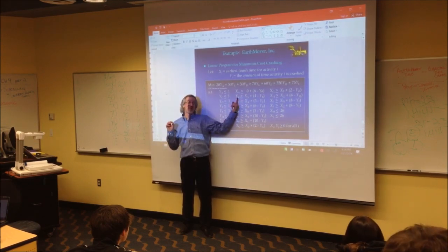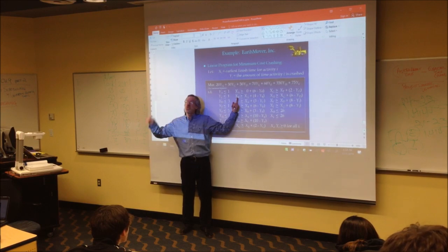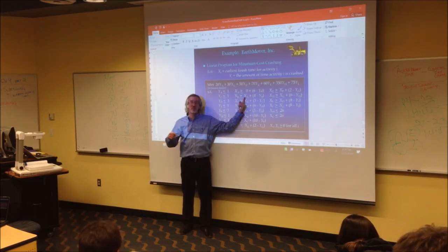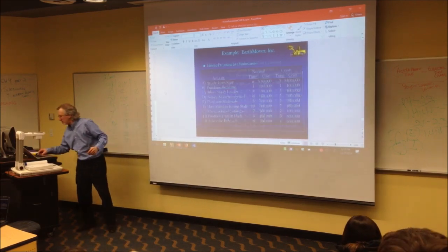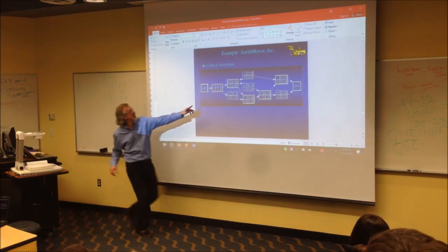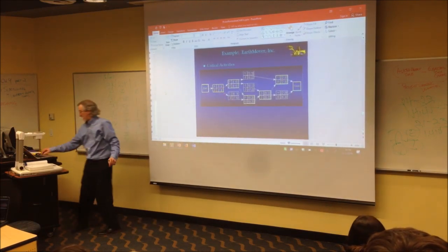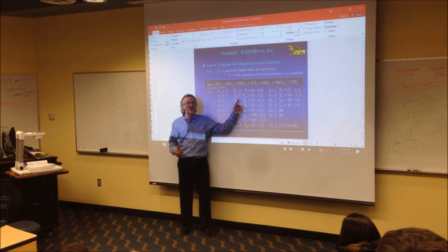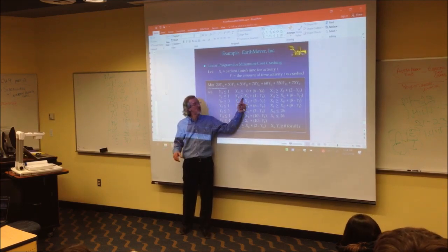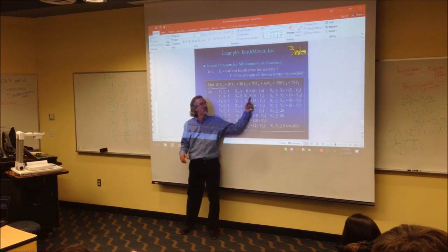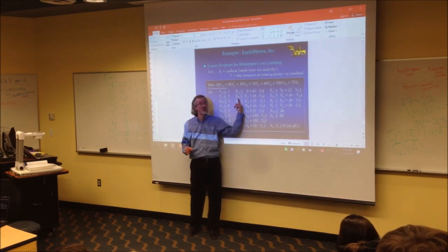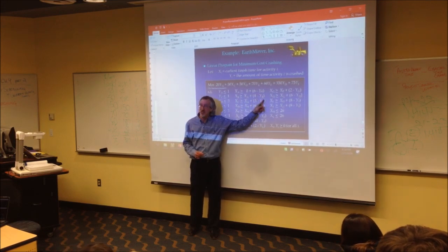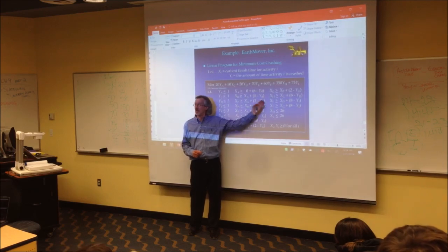So we're going to write an X constraint for activity B. The X variable for activity B, greater than or equal to the X variable for whatever activity precedes it. Well, we better go look at B. Sure enough, what precedes B? A. So we put X sub A there. Don't worry, this is going to get a little more difficult when we get to one that has more than one preceding. X sub B, we're writing this for B, is greater than or equal to the preceding activity's X variable, X sub A, plus, in parentheses, the normal time for the activity you're writing this for, which is 4, minus the Y variable for the activity you're writing this for, which is Y sub B. So you can set these up, right?